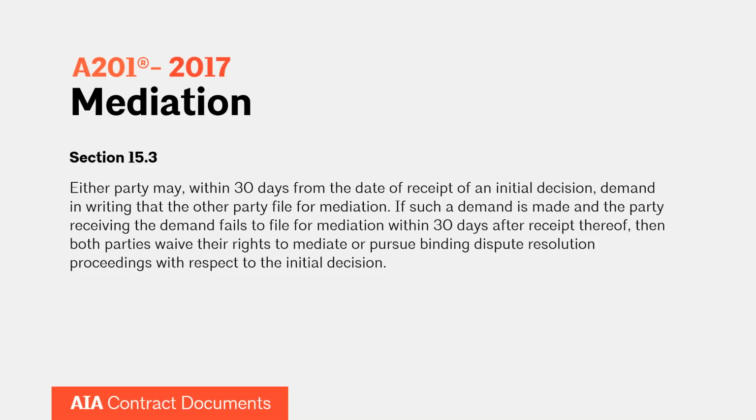So as I mentioned earlier, mediation is sort of the next step in the process. If the parties don't agree with the initial decision maker's response, they can go to mediation. And mediation is basically a meeting between the parties. It's a non-adversarial setting. You sit down and you try and resolve your dispute, usually over the course of a day or two, and usually with somebody who's not really related to the project, either a retired judge, an attorney who's experienced in this area, or a consultant, somebody who can sit down, evaluate the facts, listen to the positions, and go back and forth with the parties.